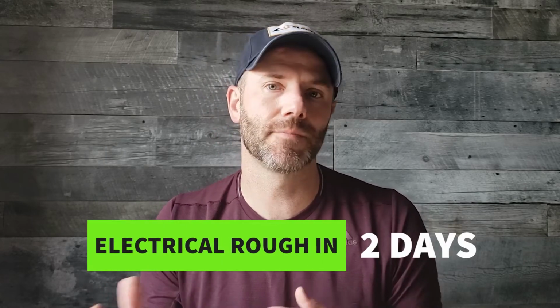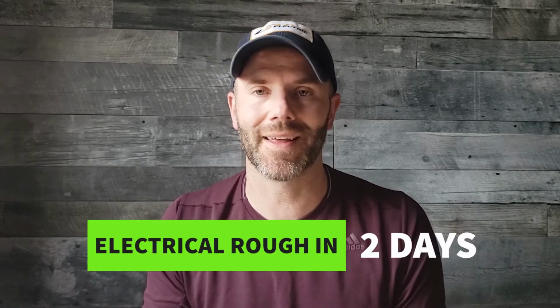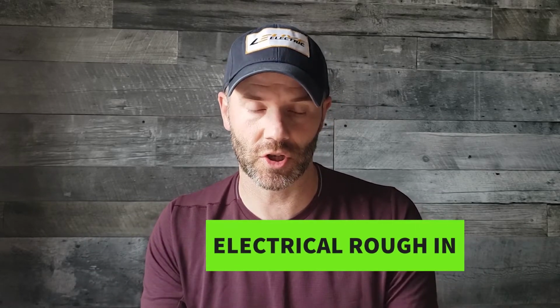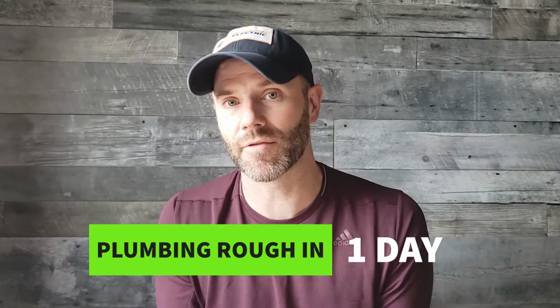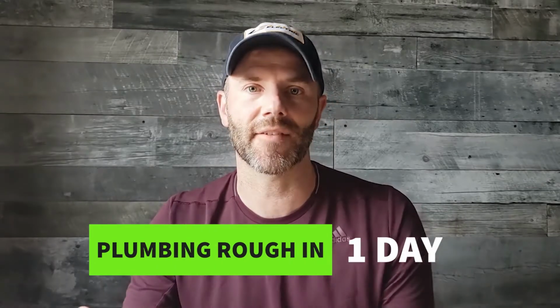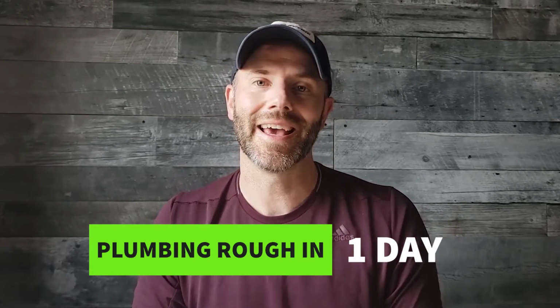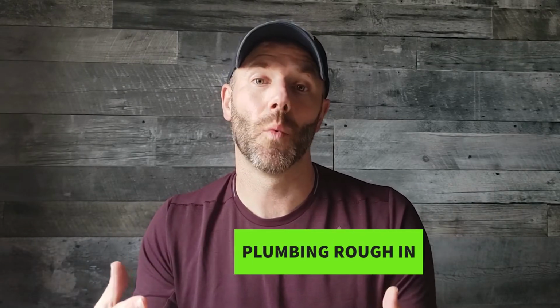Next is going to be your electrical rough-in, pot lights, plugs, switches, bathroom fan, and so forth. Expect that to take 2 days for an electrician to do it. Next is your plumbing rough-in. So that's finishing everything that's above ground, your water lines, your drains, putting everything where they finally need to be before the drywall goes on. Expect that to take 1 day.